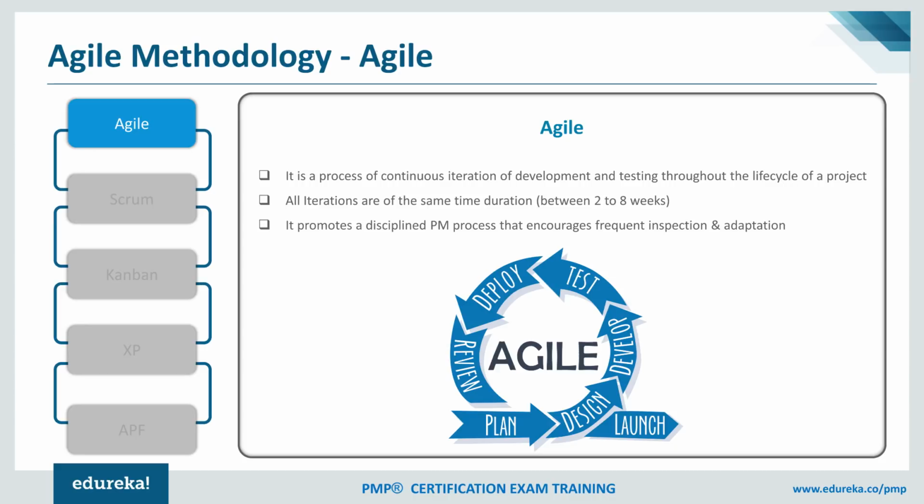We don't work in phases, but we ensure that we build the features, or cut down the product, in vertical slices, which helps in covering the end-to-end development of the features, right from the UI till the infrastructure element. So all the layers are covered as a part of that. And the iteration could be just 2 to 4 weeks in duration. As a result, there is continuous inspection and adaptation that happens within the iteration.